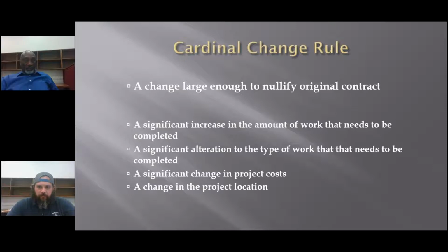For an example, we had one building that we submitted a proposal to put up, a 40 by 50 building. When we got out to the site, we learned that little 40-foot by 50-foot building was on a platform that was 30 feet in the air. So that obviously was grounds for a renegotiation of the contract and rechecking everything that has to be done out there at the site.